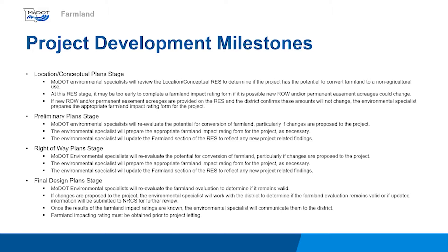The district will submit an RES at each project development milestone. These project milestones include the Location Conceptual Stage, preliminary plans stage, right-of-way plans stage, and the final design plans stage. The district initiates this process by submitting an RES to the Design Division. Every project requires the submittal of an RES, regardless of the NEPA classification.